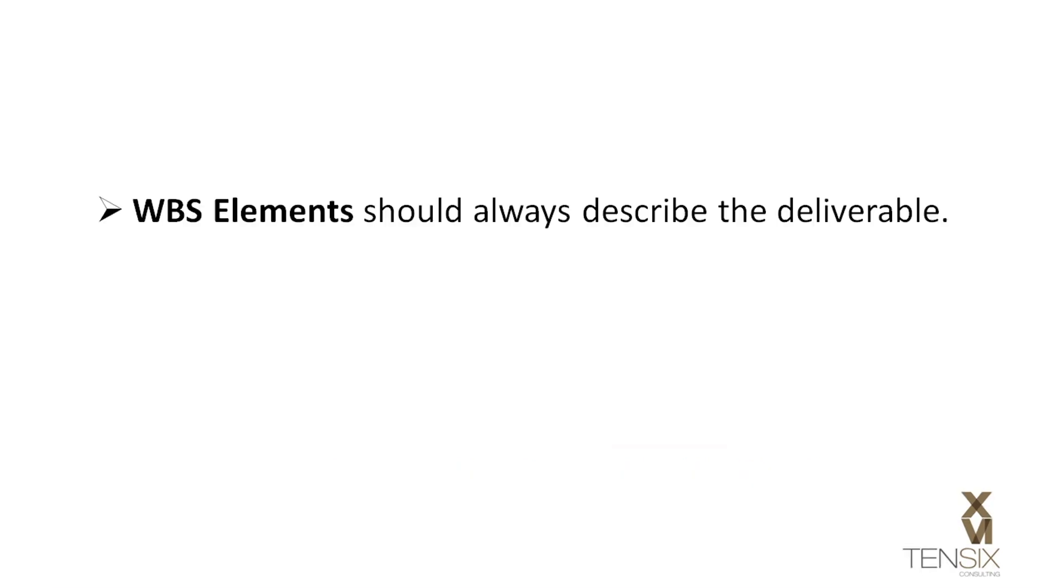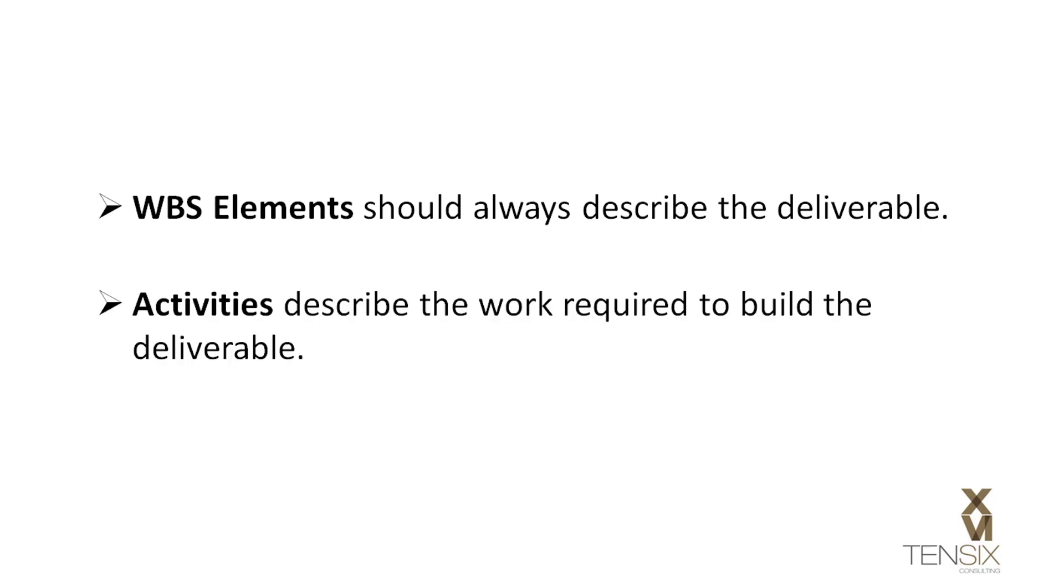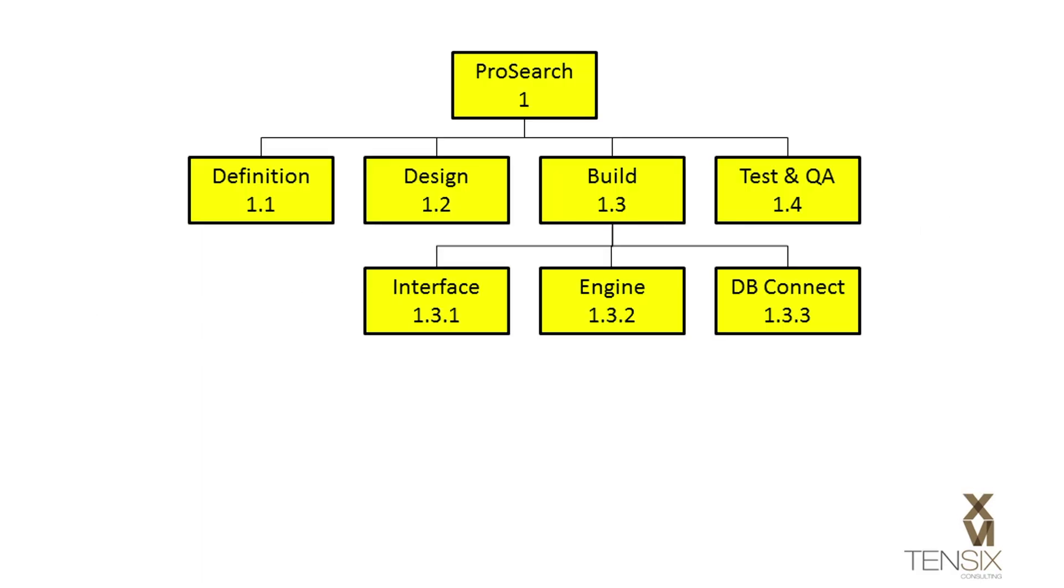Just keep in mind that the WBS element should describe the deliverable, and activities are a description of the work required to create that deliverable.